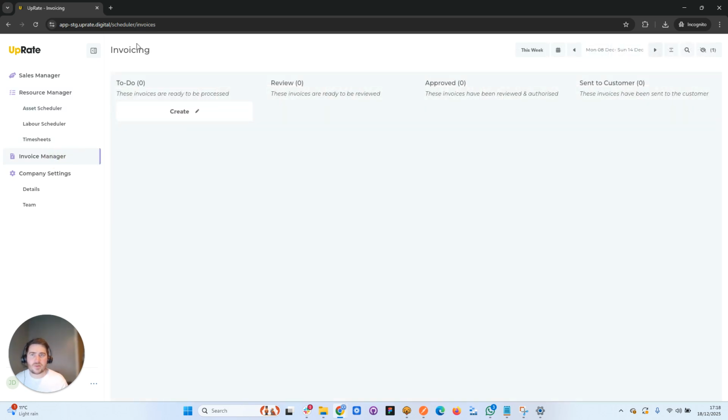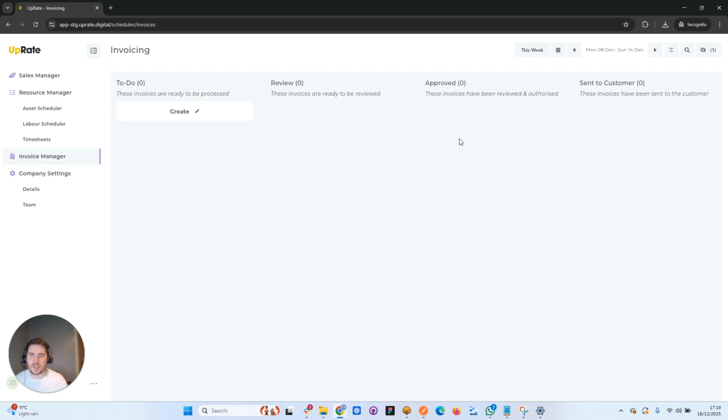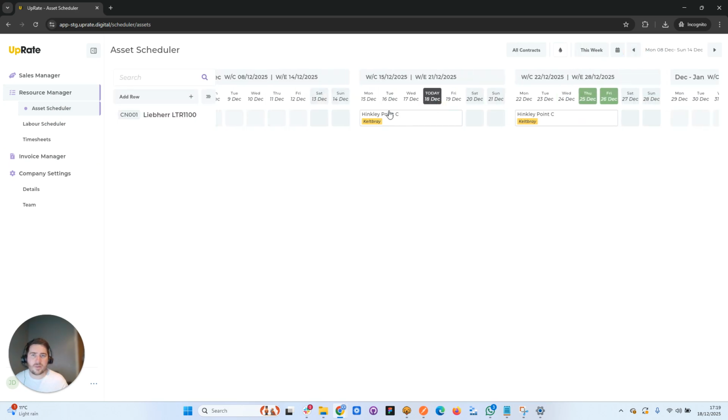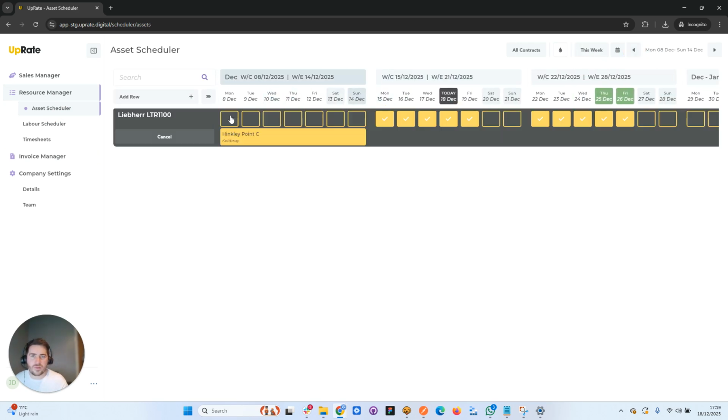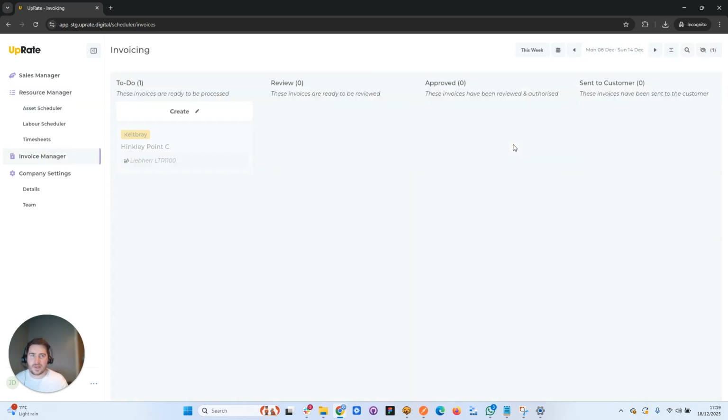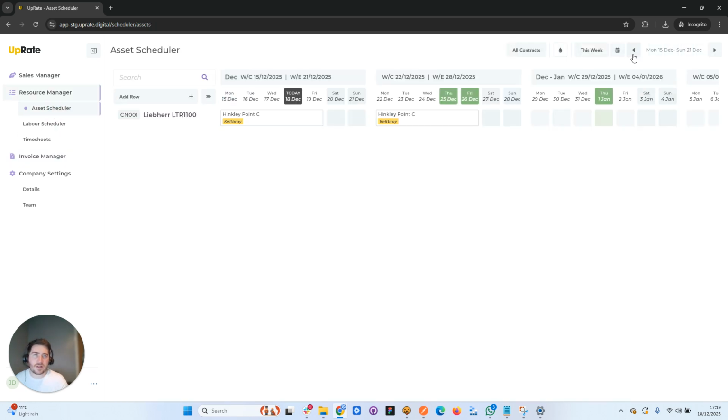to the invoice manager. You'll see if I refresh the page, it just takes a minute to come through sometimes, but you'll see that it should now have, yeah, so sorry, because I booked that in from the 15th, I should have done it from the 8th. Okay, so I booked the crane in from the 8th of December through to the 26th, and you'll see that now I've got an invoice on the 8th, I've got an invoice on the 15th, and I've got an invoice on the 22nd.